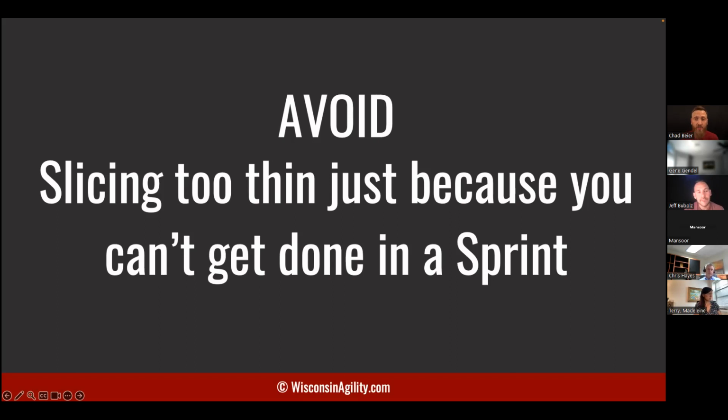I was going to say, imagine the risk avoidance, because you might be thinking, well, why does it matter? If we dig all the holes in one day and then as a landscaping team come back and mulch and plant all the shrubs, why can't we just do that over 3 days in that order? Well, here's why. Imagine after the 3 days, the mulch goes in across the whole front of the house. And then at sprint review, I'm the stakeholder, and I come in and I say, oh, that's not the right style of mulch. You're going to have to rip all that mulch out, right?